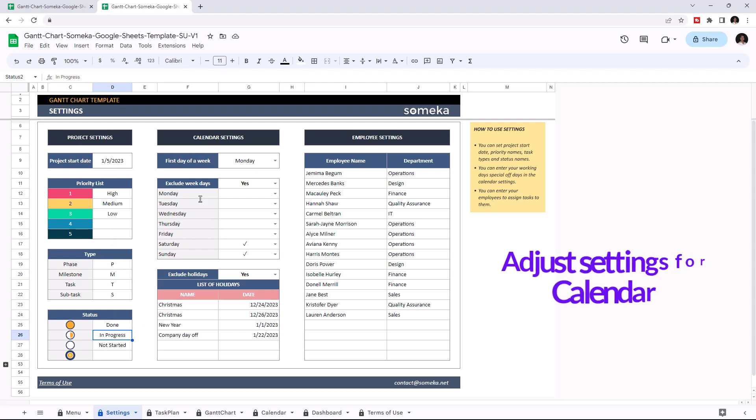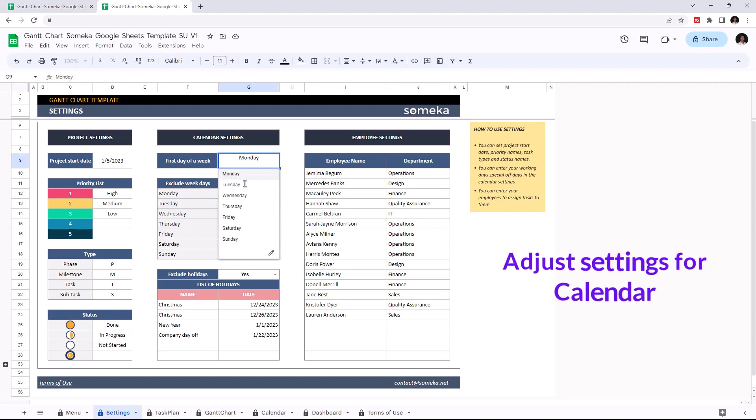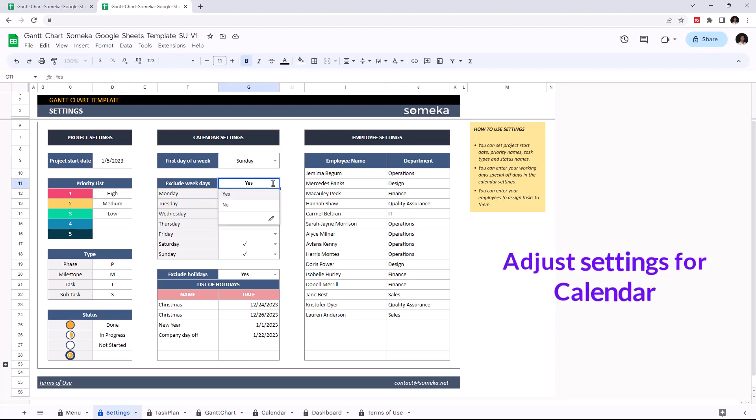You can also adjust the settings for the calendar. Choose the first day of a week, and you can also choose to exclude weekdays and holidays, and indicate the days and holidays you want to exclude.